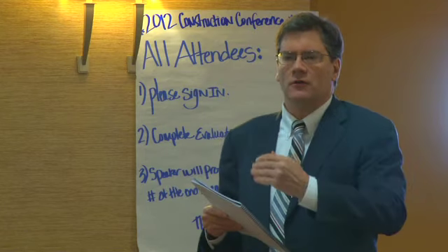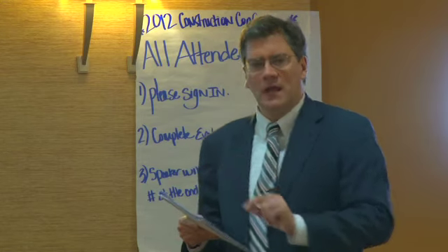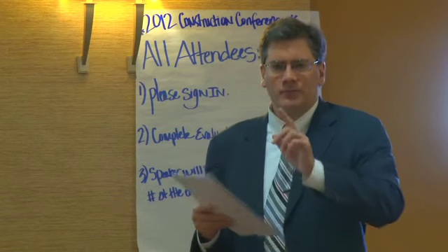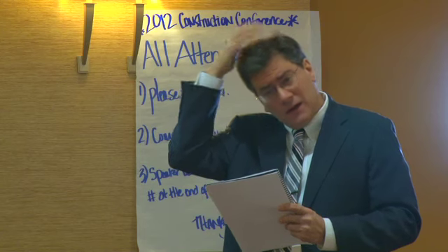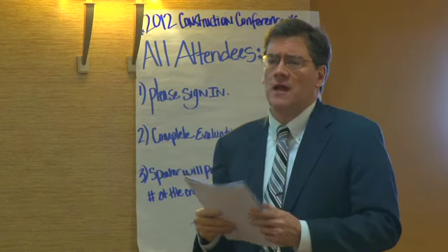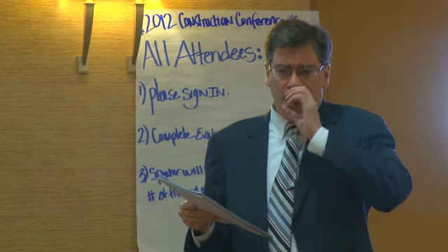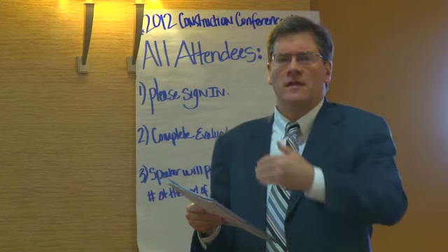You've got to keep the owner's check and say, let's do it a little bit differently. I'm going to cut you a check for your labor portion, and I'm going to keep the joint check endorsed here. That's how you want to do it. Now, I advise, it kind of depends on the situation. Frequently, I'm advising clients, if they're suppliers, to cut the check for the labor to the subcontractor. They keep the builder check.